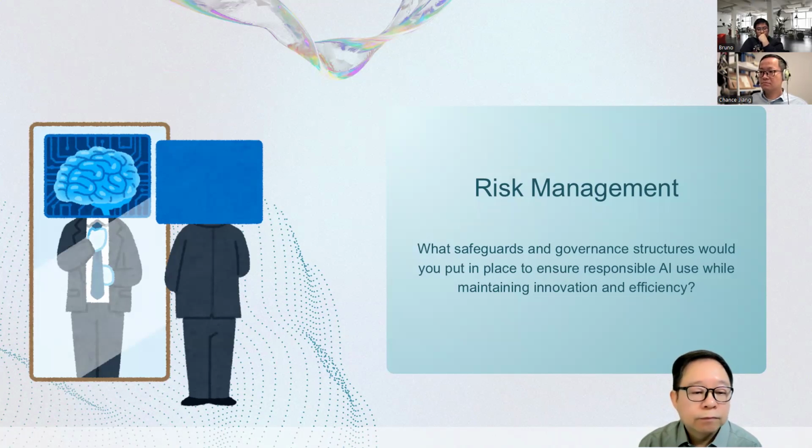So we need to jot down in Excel, and management, before they implement and even post implementation, need to jot down all the risks. And then if the possibility of the risk is low, then the safeguard or the governance of these risks can be played down. If the possibility of the risk is high, then we need to do something about it.